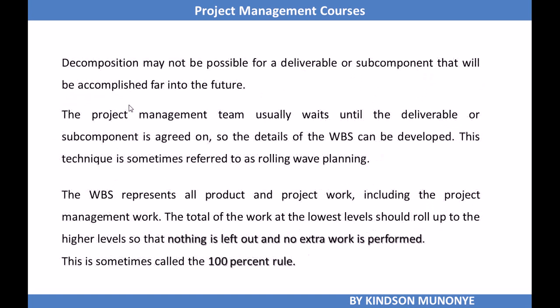The decomposition may not be possible for a deliverable or subcomponent that will be accomplished far into the future. So components or subcomponents that are to be worked on, accomplished in the near future, are broken down. Now there is this concept of the 100% rule.